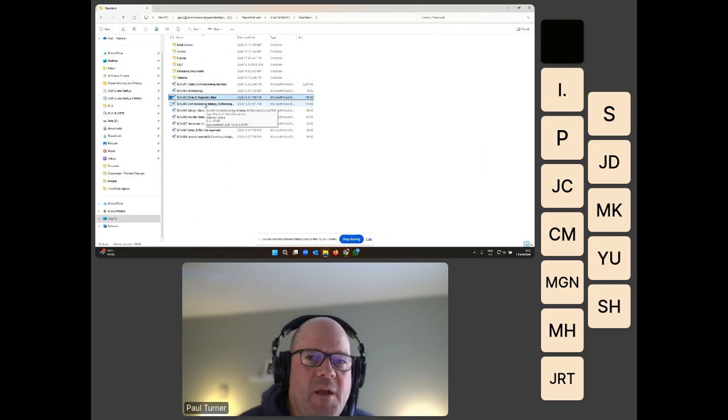The first one being your project commissioning plan, which is the first document that defines the commissioning strategy, prepared during FEED or often even earlier during the project concept stage. But whenever the overall project execution plan is being prepared, the project commissioning plan is one input to the PEP that defines the overall commissioning strategy at a high level in the early stages of projects.